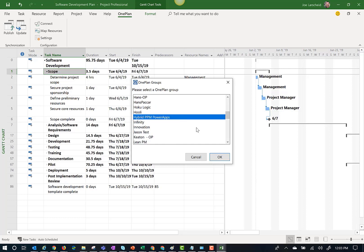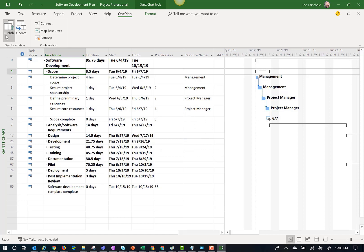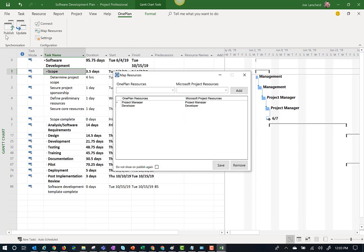Now that Microsoft Project is connected to my OnePlan group, I can now simply click the publish button. The first step in publishing your Microsoft Project plan is to map your local resources to the OnePlan resources. This dialog box allows you to map those resources.